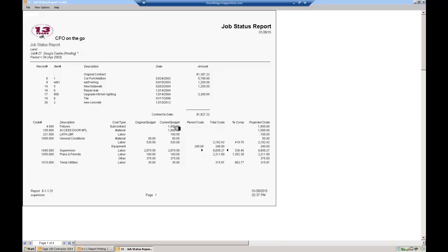And then it does something real quick here. It looks at the budget column, and since I haven't spent anything, it projects out my budget column. In this case, I had a $2,900 budget. I did not estimate this job, by the way, just to be upfront. Estimated 29. I've actually spent 97, so it projects out to 97.